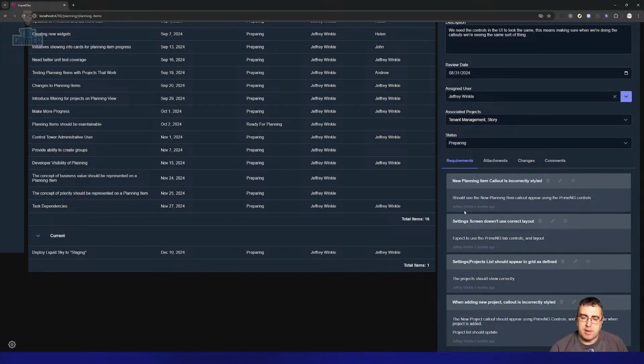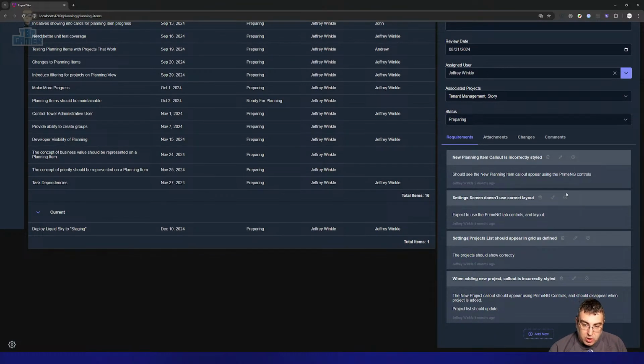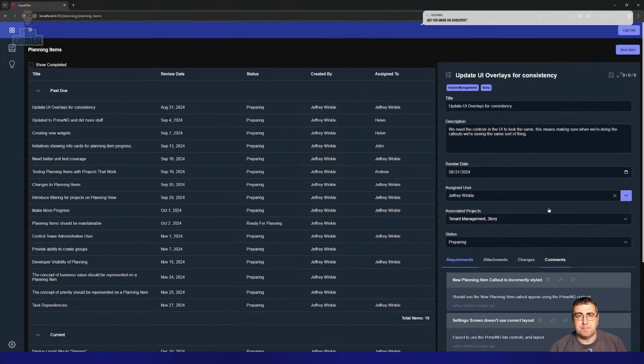And QA might be testing at the requirement level, but they might also be testing at the task level if they need to. But again, QA can figure that part out while discussing with the developers, and the work can be defined and broken down in a way that makes sense to the developers. It can wrap up so that the product management can see, oh, this has 5 tasks associated with it. If a new task gets added, the product management team can be told, oh, they added more work to this piece, and they can ask the question, why did more work get added to this piece? We thought it was well defined. You know, those sorts of challenges can happen. You can probably potentially lock it down.